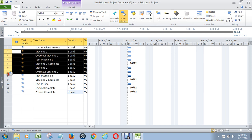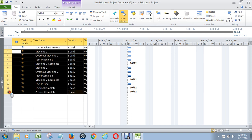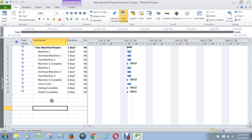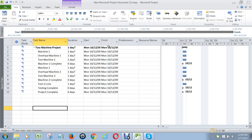So you go over to the left side where these line numbers are, highlight everything, go to the Task menu, and then click on the green indent button. See how it makes two-machine project the project summary task? Eventually it will summarize information here as to when the project starts and when it finishes, providing you with the top line of the whole project.